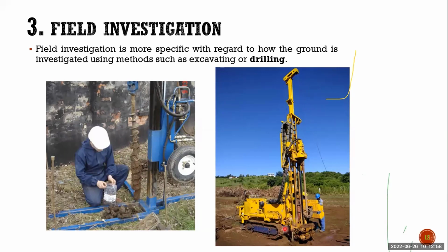In rotary borehole drilling, we collect core samples. The core samples can be soil or rock, no problem. We collect the samples and they are placed in the core boxes as per the depth collected. I'll show that picture.